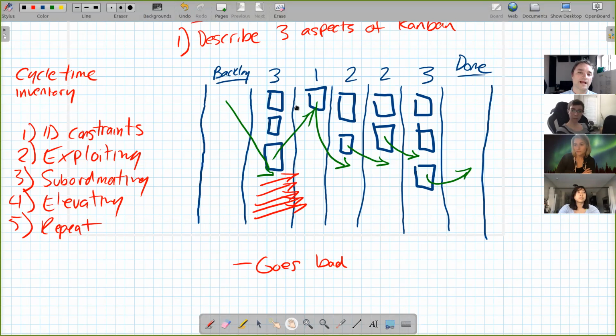You could, like in traditional Kanban, all of your work items are supposed to be relatively similar size. And so the WIP limit just applies to the number of work items. You can also put sizes on these, and then your WIP limit applies to the size. I think what you're really asking is, how do you determine the WIP limit? And the goal is to make it as low as possible. And so you make it as low as you can without disrupting flow. And it takes some experimenting and it takes some searching.